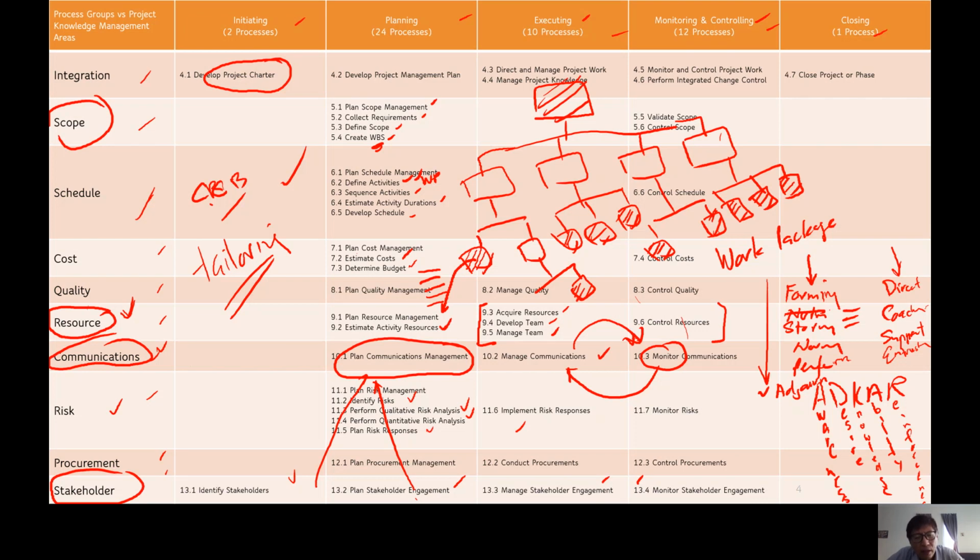That's the idea. So what you're seeing is that there is some residual risk. A new term for you in risk management: residual risk, the risk that is still remaining, that you did not clear off. You cannot remove the root. That's why it came back to haunt you again and again. So that's residual risk. Things like this do happen. I'm not saying all the time, but yes, be ready for it. Have you dealt with the root cause?